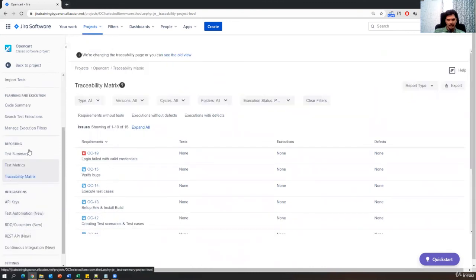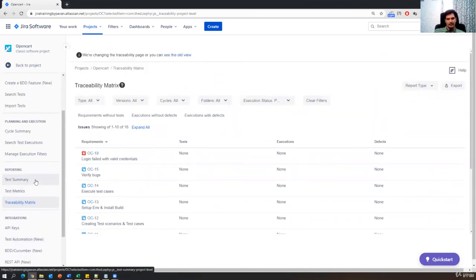So these are the three important reports in Jira, especially on the test management side, and charts, which again belong to Agile, burn down charts, velocity charts. So they will be taken care of by our Scrum Master. They will analyze the report and check the health of the Agile process, like how the process is going on, what the blockers are, how much extra time is needed. Those things will be analyzed by the Scrum Master by seeing those reports. And the test reports will be taken care of by us. Even our management leads will look at these reports, to see how our testing has progressed.